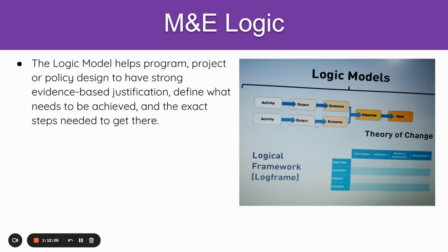What is our baseline? From the first start, we knew that there was no hand pump in that community. There was zero hand pump, and so there was zero access to safe drinking water. So the baseline says zero access to safe drinking water. Now we can tell that we have 30 people out of 50 who are using the hand pump. That is a real change. That is huge impact we have made in the community. All right. So that is just an example of indicator.